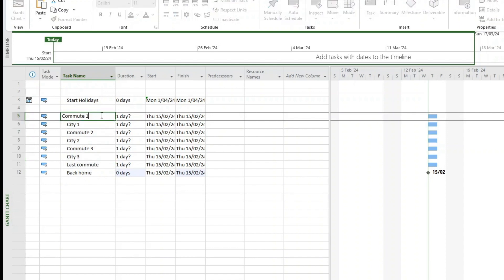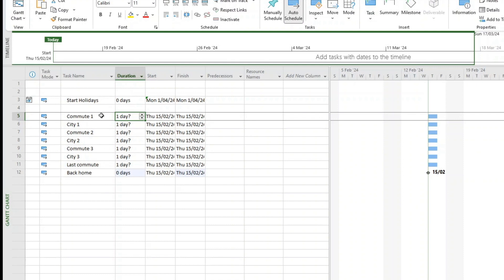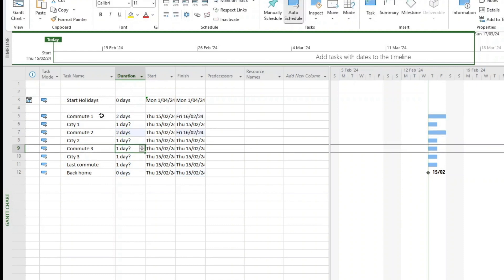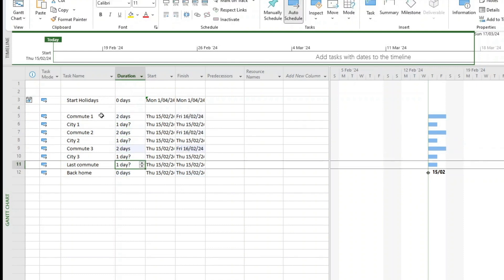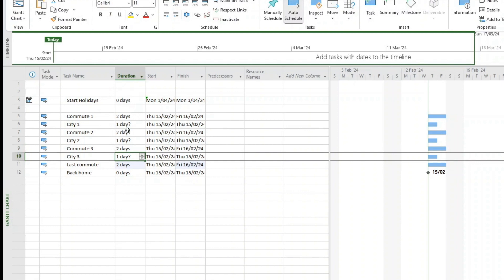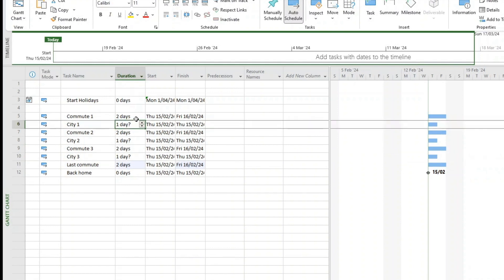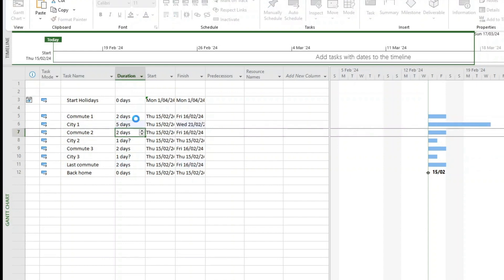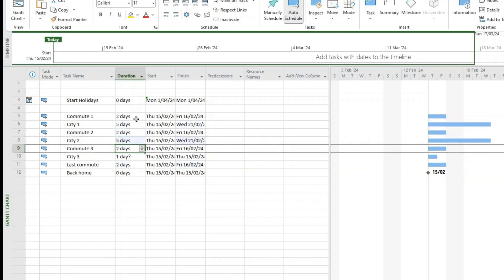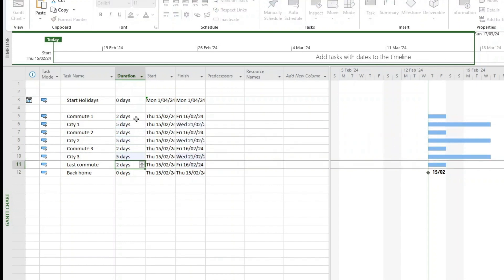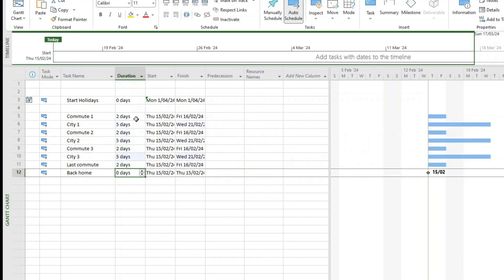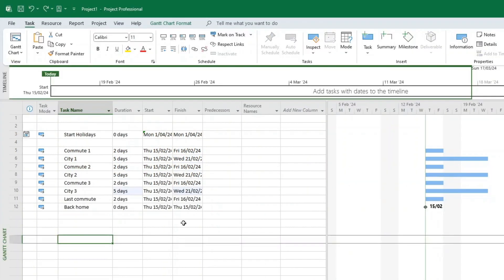But before I do this, I'm just going to give a duration for it. So we say two days commute, so put two days for all the commute: two days, two days, two days. I put that in the duration here. And for the city visit, I'm just going to put five days as we decided. So that's it. So now I have all my dates input, all my duration inputs.